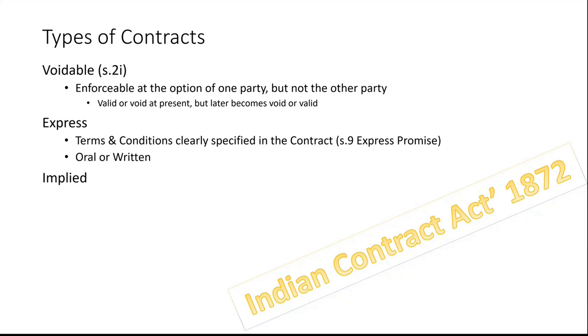Frustration is a situation where you can't do anything. It's more than force majeure. That we'll discuss. One thing, since you mentioned the turnkey lump sum project: if there is any abnormal change in the prices, can the client and consumer go rigid? No, it's a turnkey and you have to execute it, whether the prices are going up to the sky or below the floor. This is the question I was going to ask you just before your break. And you broke it. Sorry.